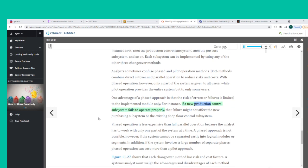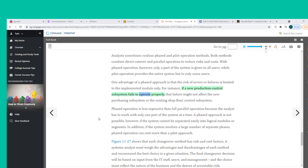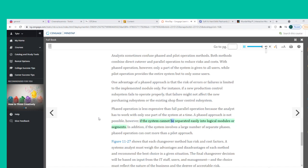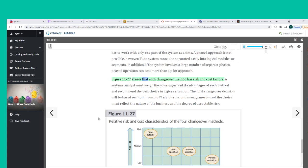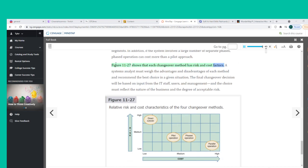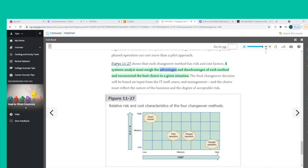One advantage of a phased approach is that the risk of errors or failures is limited to the implemented module only. Phased operation is less expensive than full parallel operation. However, a phased approach is not possible if the system cannot be separated easily into logical modules or segments, and if the system involves a large number of separate phases, it can cost more than a pilot approach. Figure 11-27 shows that each changeover method has risk and cost factors, and a systems analyst must weigh the advantages and disadvantages of each method to recommend the best choice.